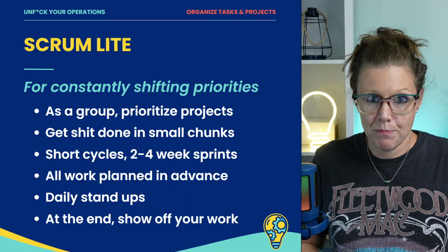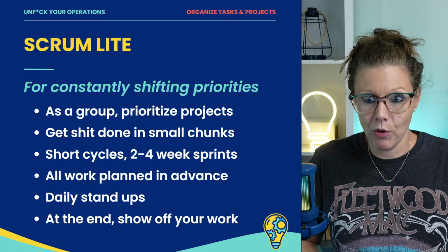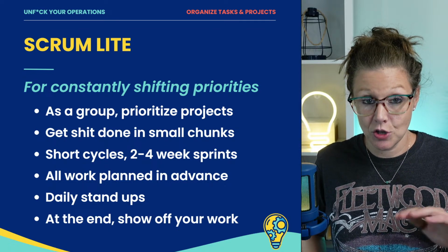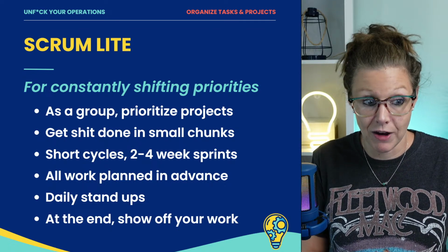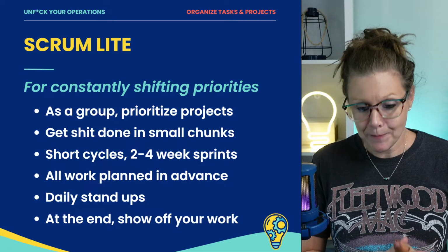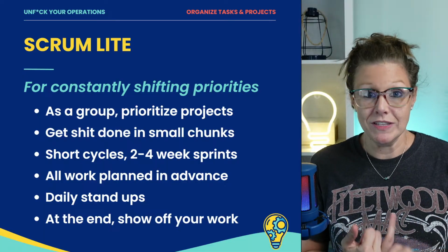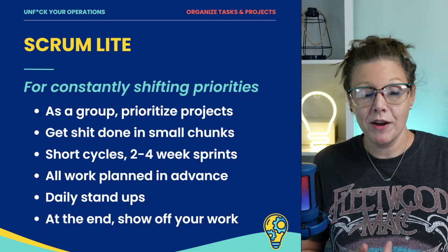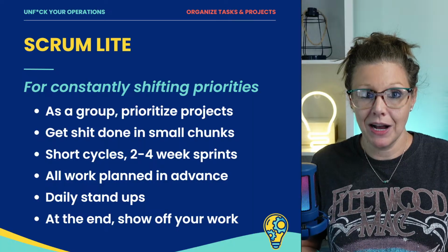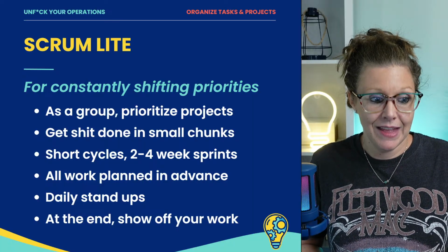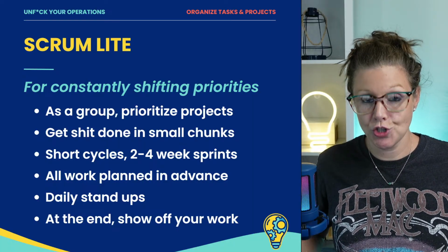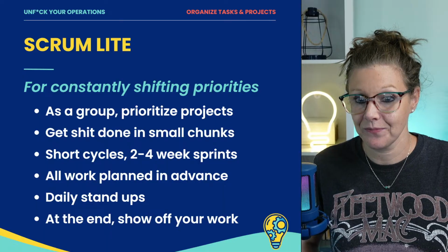One of the core parts of Scrum is a daily stand-up where you meet with the team for 15 minutes, no longer. If it goes longer, you're not doing it right. Every person says what they got done yesterday, what they're going to do today, and what is blocking them. And at the end of those 2 weeks, you show off what you have gotten done.